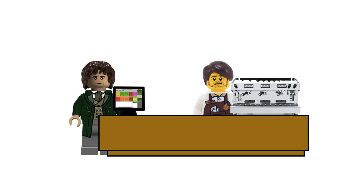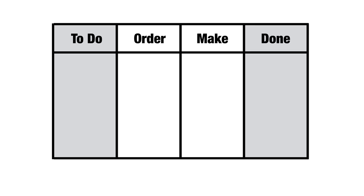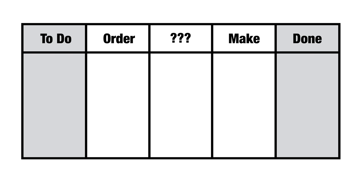Now back in the coffee shop, we avoided being pushy by using the space between the till and the coffee machine — a buffer between Doctor Who and the barista. A buffer between two adjacent processes, a mechanism for handling the transition, the handoff, from one process to another. Surely we can't represent an empty section of countertop on our Agile board. Well, we can, and for the sake of everyone involved, we must. And it's with a heavy heart that I have to colour it grey.